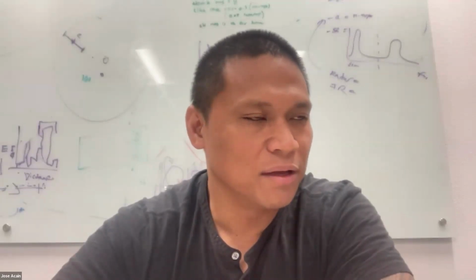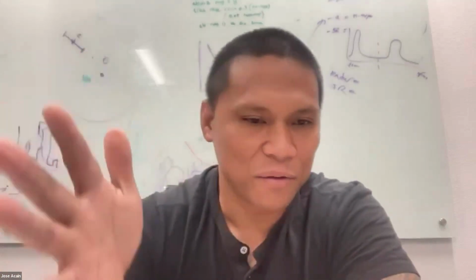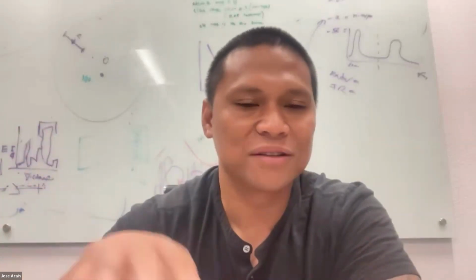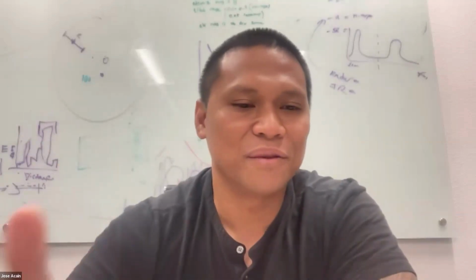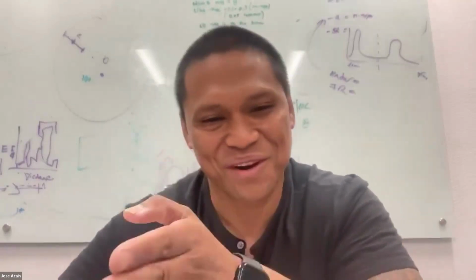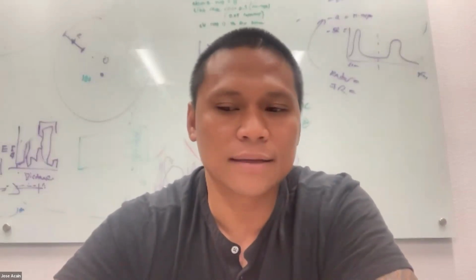Love it. Yes, absolutely. We actually ran into exactly what you were saying. We were moving too quickly on our end, and we didn't go through Duro, we didn't go through Epsilon. We were like, cool, let's just go straight to the root source and get this information. And it was not the right version. If we would have followed the process, if we would have gone through Duro and the Epsilon process, we would have seen, oh no, this is the correct rev that we're supposed to be using because this is the latest that's on here. And it was a time hit as well as a cost hit for us.